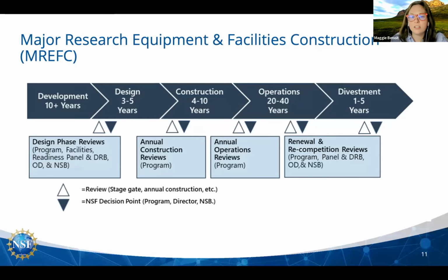But once the design is finalized, NSF takes that design and issues a solicitation where it's openly competed. Any entity that wants to submit a construction proposal can submit one to NSF to construct that facility. So this is where NSF takes a bit of a hands-off approach to interacting with the community, so that we can fairly and openly compete the construction of that facility.